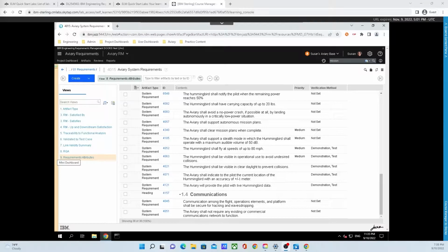You will then set the link validity to valid for the requirements you manage, and then before attempting to deliver your changes to the team, you will see how to compare the differences between Susan's work area and the original requirements. Finally, y'all will attempt to deliver the changes, which will not be possible as the project is under strict change control, and although Susan has linked her changes to a work item, that work item does not have the correct approvals.